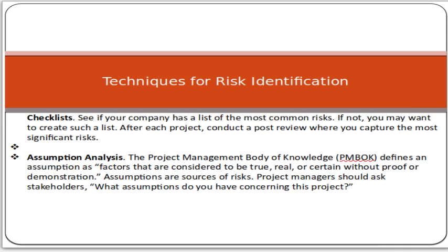Then the assumption analysis. This is a very important topic, friend. As per the PMI or PMBOK, Project Management Body of Knowledge, an assumption means anything which may or may not occur. Sometimes an assumption is true, sometimes an assumption is false. For example, you are going to implement a project at the client side, and you are assuming that the internet connection would be available there. So this is your assumption. But sometimes it happens that it will not be available.